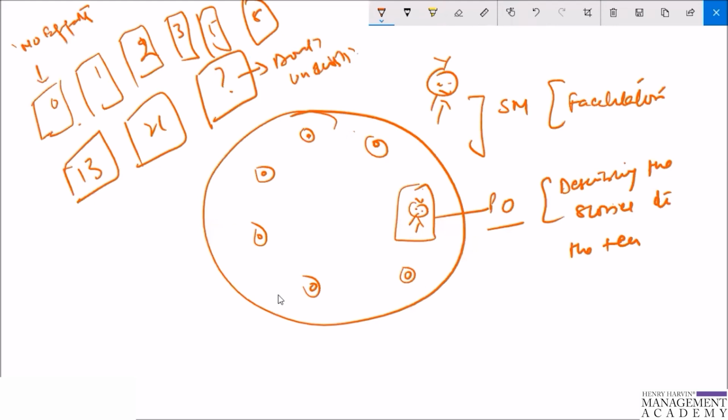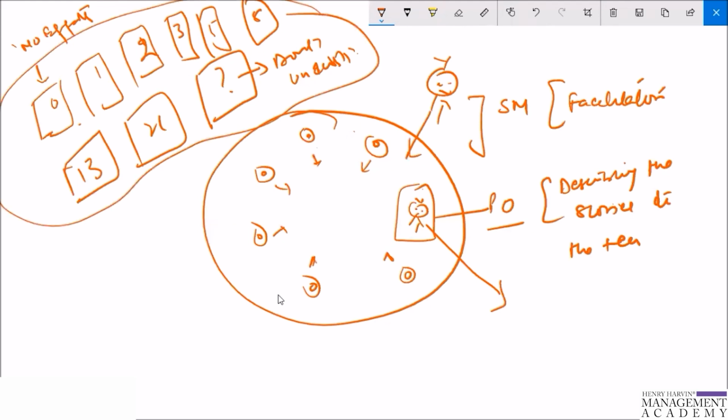So when this product owner describes the story, all these persons who have to estimate the user story should clarify their point, why and what needs to be done within the story. Once that is done, this facilitator asks everyone to show their card, because this deck of cards is with each and every person who is sitting in the room.